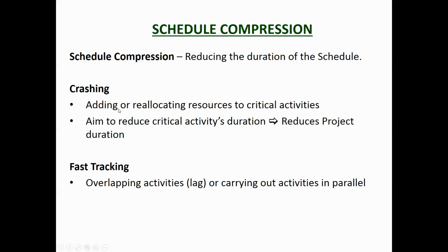Or you can bring new resources on. So instead of having 2 or 3 excavators, you get 3 or 4. So you bring a couple more on. But that has cost implications. So it's going to cost you more. So you just hope that that extra efficiency is going to result in a cost saving overall.